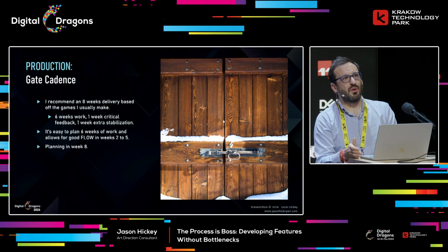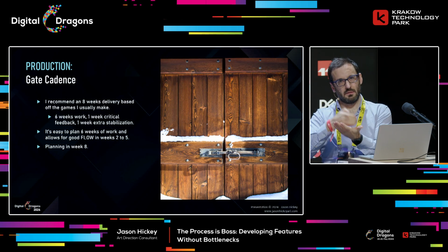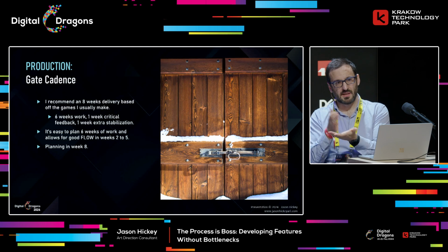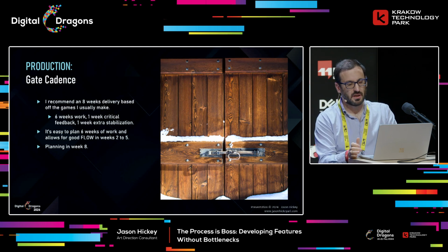And then you should probably have your director feedback. So the directors will play all the game and have a really good list of feedback for week 6 so that the team have time to actually implement that for the delivery on week 8. And then you have stabilization as well.